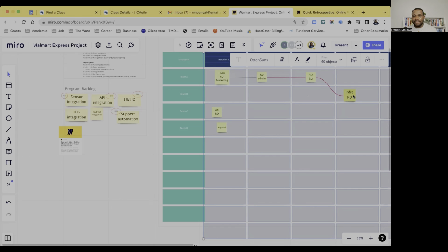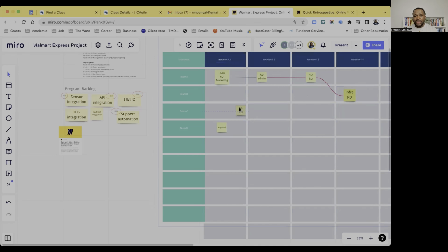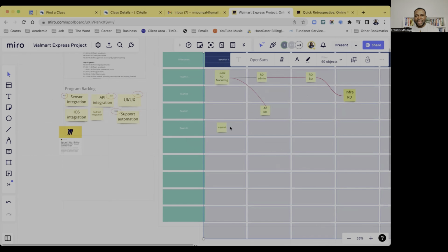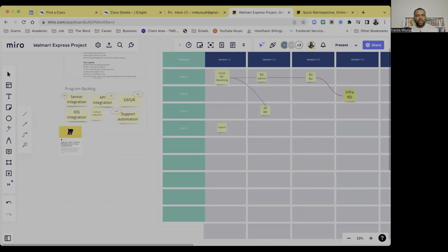Now, let's say that this one, Android research, can start immediately when we complete this one. So this team will be able to start their work. It's dependent on this one finishing, and then they can start configuring what's going to happen after. Right. Now, let's say that at this time, support R&D is also dependent on support to get their own work kick-started. Now you realize that all of this is also going to happen.